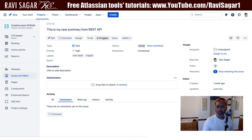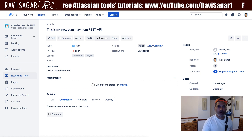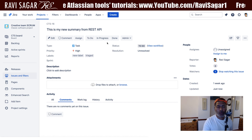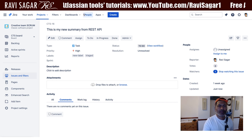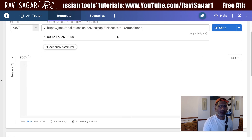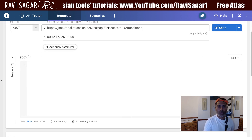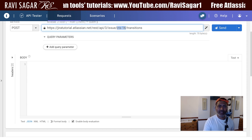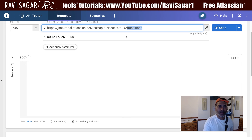Usually you will have some action ID for each and every transition in your workflow. In my case, for 'in progress' it is 21, and for 'done' it is 31. I will go to my Talent API tester and use the endpoint REST API 3 issue followed by the issue key, and then 'transition' at the very end.